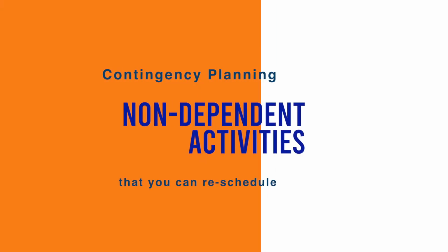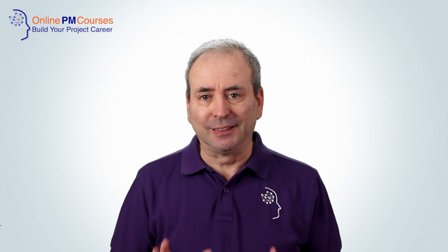Number 2, look for non-dependent activities that you can reschedule to give yourself more time now by placing them into the future. If you need to turn your attention to something serious that's happened now, it's helpful to know quickly which activities you can delay, defer to another time, so that you can turn all of your attention to the things that matter now. Importantly, these need to be tasks that you can defer without affecting the final completion date, so they will be tasks that do not lie on your critical path.